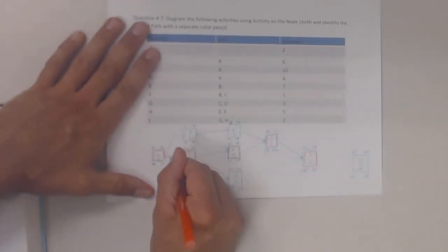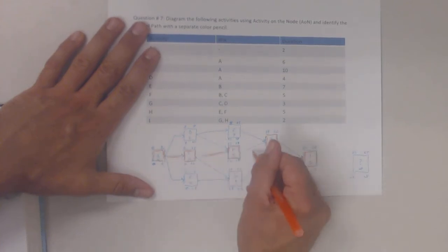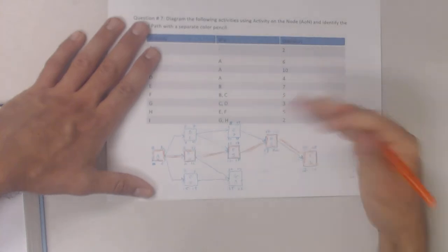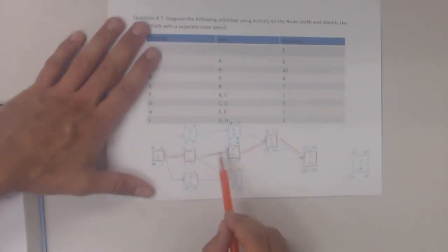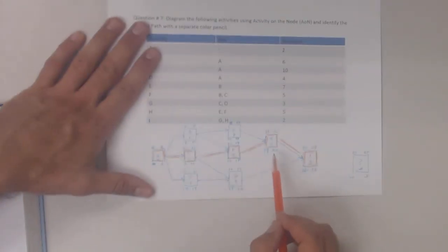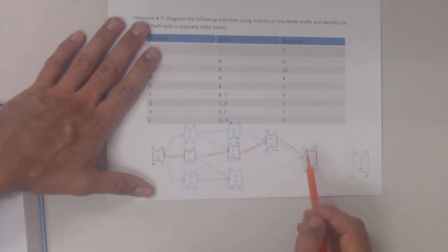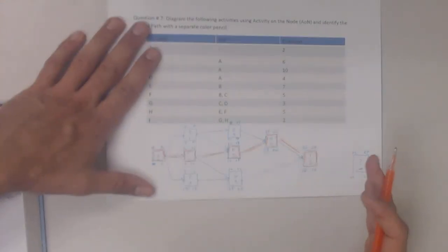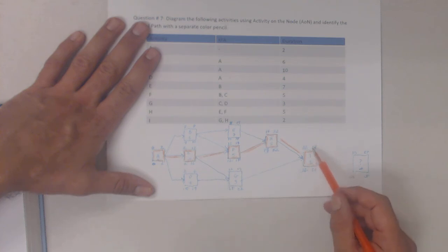So I also have to link these logical links right here and indicate what the critical path is through this network. What does that mean? That means that these activities, I have absolutely zero room for error. If I deviate from the durations on any of these activities, it's basically going to push the project out. If I shorten the critical path, I have the ability to shorten the entire project. If I'm late on any of these activities, I'm not going to hit the project on day 24.